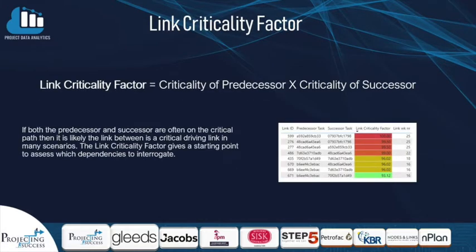We also developed a link criticality factor, which gives a list of links in the schedule that should be targeted as dependencies to be broken. The link criticality factor was defined by the criticality of the predecessor times the criticality of the successor. If the criticality of both the predecessor and the successor were high across many simulations, then it's likely that link was a driving link, and if that link could be broken in the program, there would be a big benefit to the project end date.